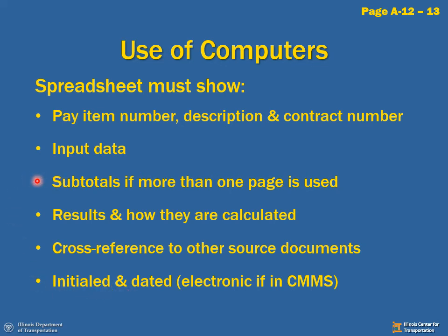That's where the subtotal comes in. If you span more than one page, each page needs a subtotal if it's printed. If you're in CMMS, you can have electronic initials and dates. No need to print it, scan it, and put it back in.